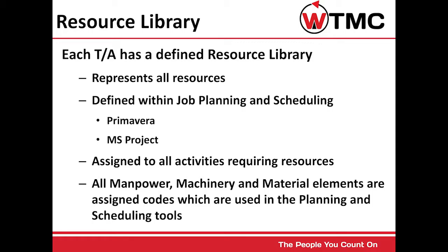It is defined within the job planning and scheduling, whether you're using Microsoft Project, Primavera, or other software. It is assigned to all activities requiring resources. All manpower, machinery, and material elements are assigned codes which are used in the planning and scheduling tools.